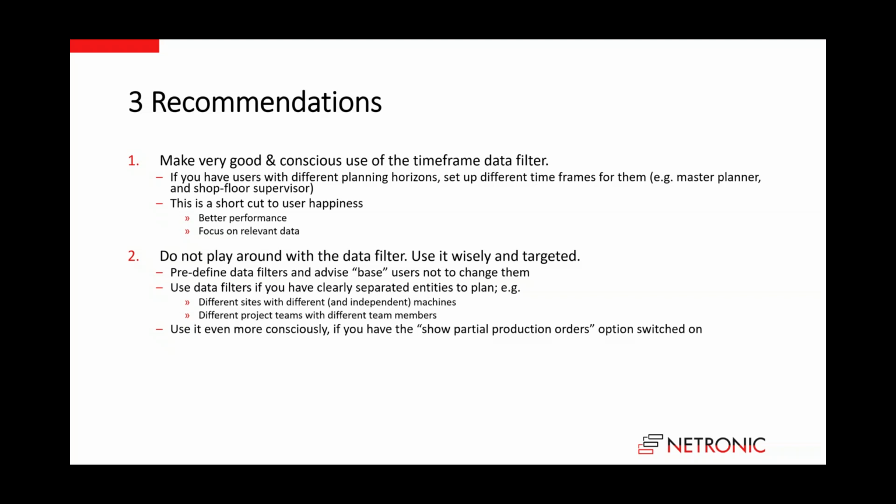Use data filters if you have clearly separated entities to plan. So for example, if you have different sites with different and independent machines, machine centers or work centers, then you can use them. Then you have the planner Peter, who looks at plant or site 1, and the planner Mary, who looks at plant B, and then you can give Peter and Mary a different schedule based on their different areas of responsibility. Same when it comes to project planning.